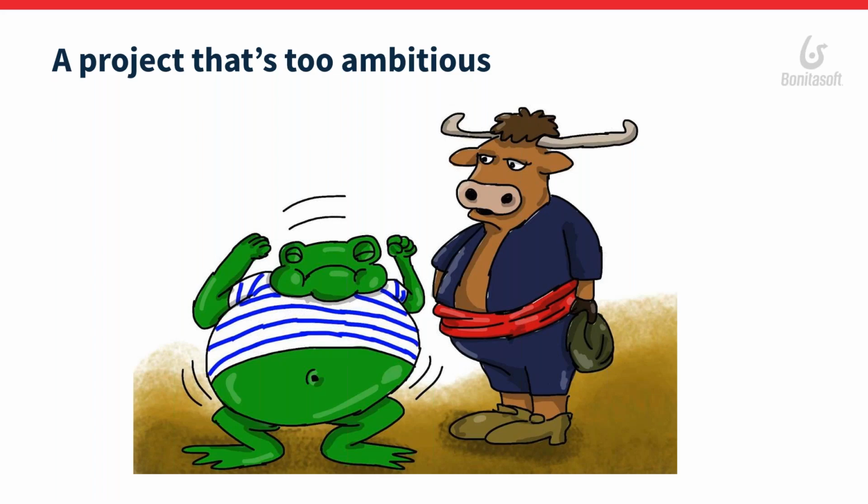That, in correlation with being the first initial steps of automation, is always the hardest, right? You have the learning curve, you have to buy the servers, licenses, and whatnot. You have to train people. It's always more expensive at the beginning, and it gets cheaper down the road with iterations. So the risk is basically searching for a too small project at the beginning that doesn't necessarily yield the return on investment in order to justify the next steps.